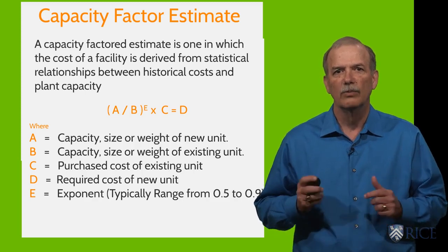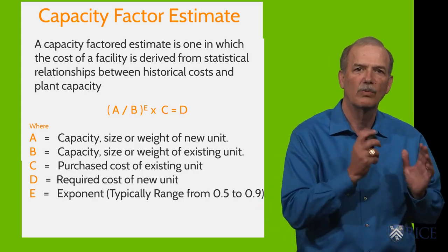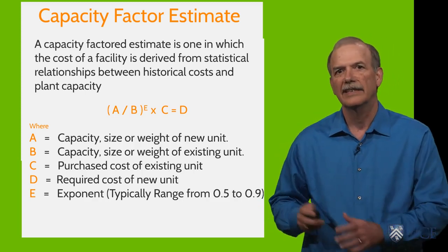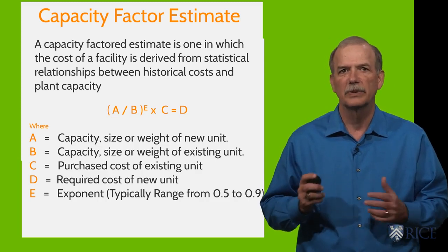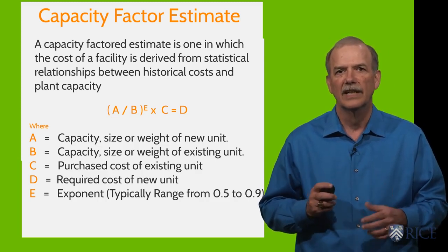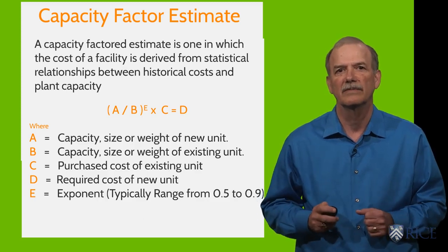In many cases, we adjust the final answer for changes in pricing information between the time the reference project was completed and the time when our project will be complete. In this case, the adjustment is made by increasing the final price by the percent increase in the base material and labor costs we expect.